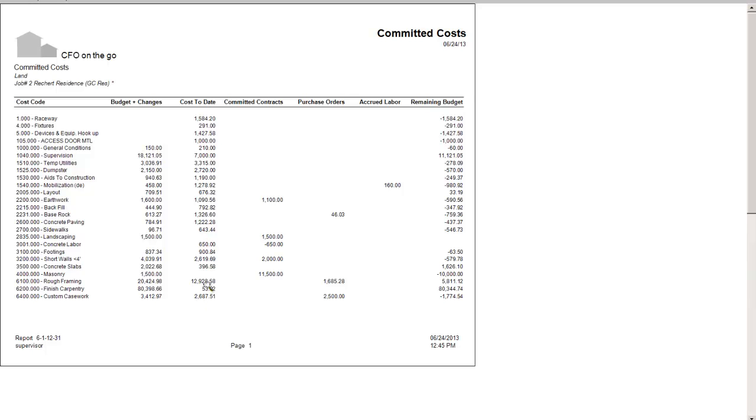what cost has come into the system so far through payroll, or like I said before, inventory transfers or accounts payable, what subcontracts have been written but I have not been invoiced by the vendor yet, and what purchase orders I've written for materials that I haven't received the invoice for yet. So let's look at this last line because it's the easiest spot.